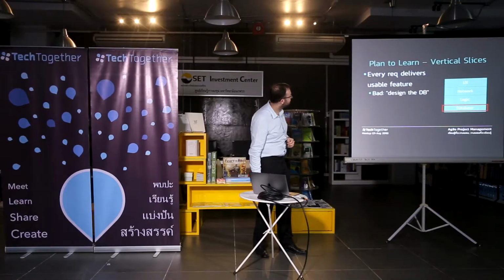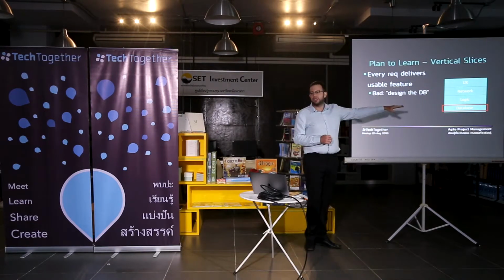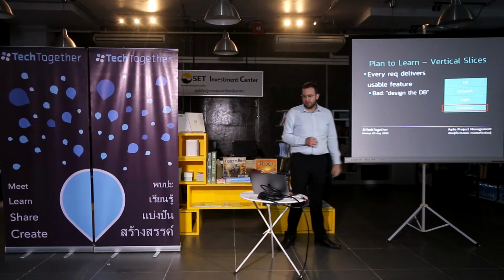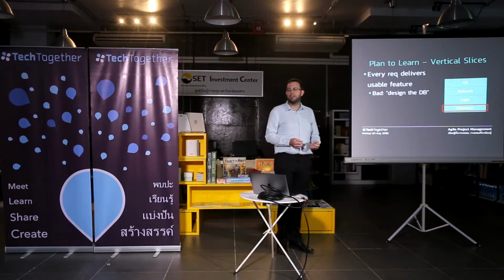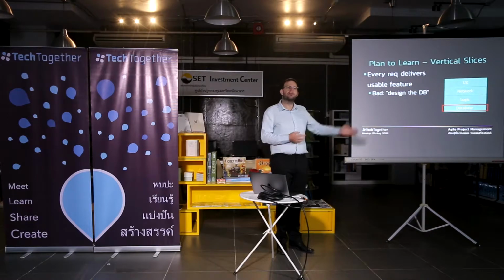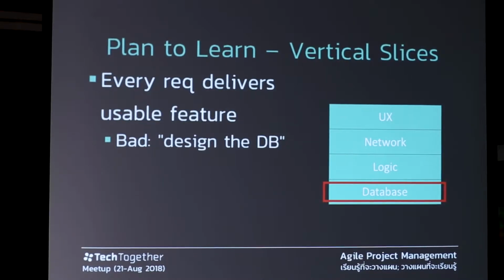Actually, that's exactly the example I have here. So I spend a lot of time working on the database. We get to the end of the sprint. I come to show my work. I have nothing. You cannot see the database. You cannot use the database. We haven't proved anything. This doesn't tell us anything about, does the product do what we need? Are we building it correctly?